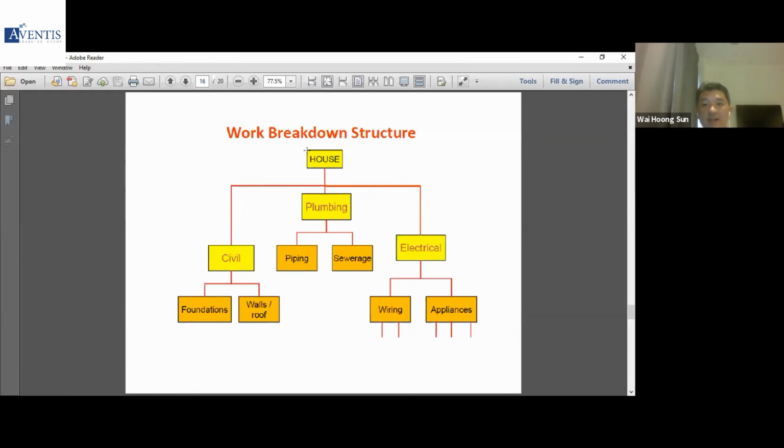That's one. And how many days does it take to work on that house? So both on the resource and on the time element, you need to break it down into smaller parts to have a better estimation. This is what we call a work breakdown structure. It is an important concept of project management, where you take a big task and try to break it down into smaller tasks so that you can have a better estimate of the resources that you need.